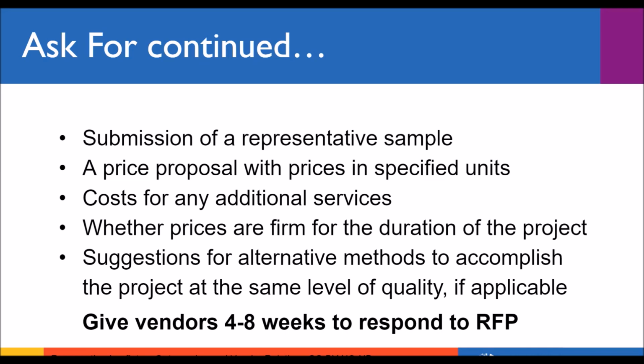So a lot of times you may have an umbrella contract with a vendor, and that might only be good for one fiscal year. If you have a really large project or you're using the same vendor for another project, prices might change. So that's something you really want to just make sure that you're on the same page about with the vendor. And then last, suggestions for alternative methods so that you can get the same results or even better results if they have suggestions. And again, we'll talk about that in another minute.